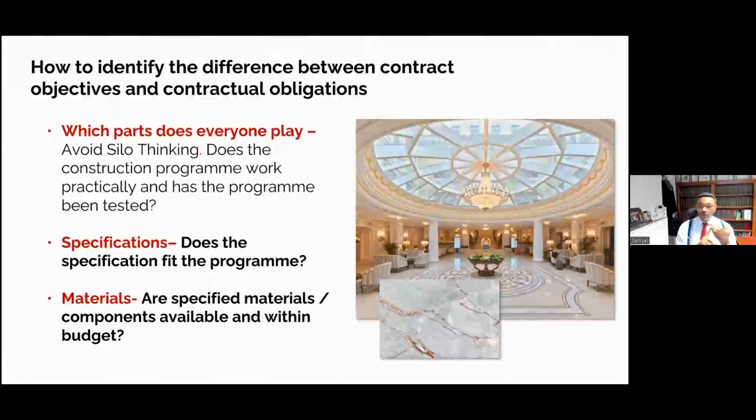So you are not just dealing with the cost of a substantial amount of diamond drilling post casting the floors, casting the structure, I should say. You're also dealing with a substantial amount of water because the dry lining that is supposed to come behind it can't. Because you bring the dry lining in, of course, you're then requiring a substantial amount of skips to take away materials that have just come to site and been ruined and removed. So what do you have there? Is a consequence, I say, a product of silo thinking.